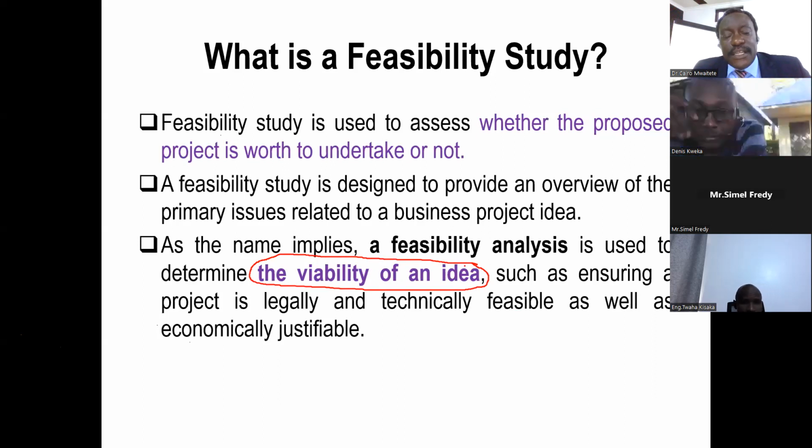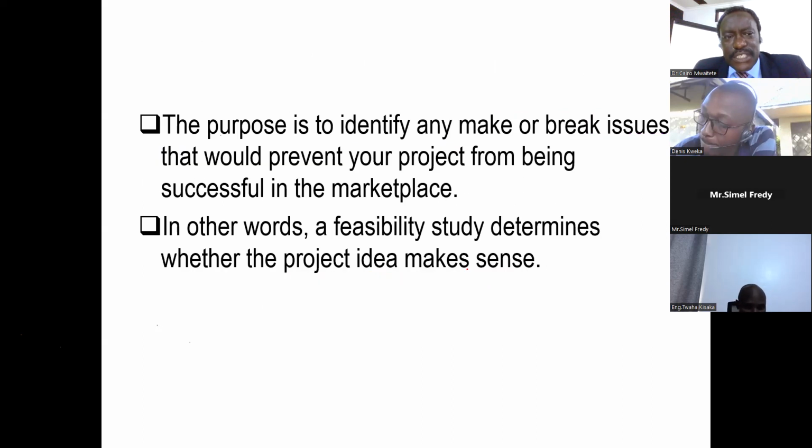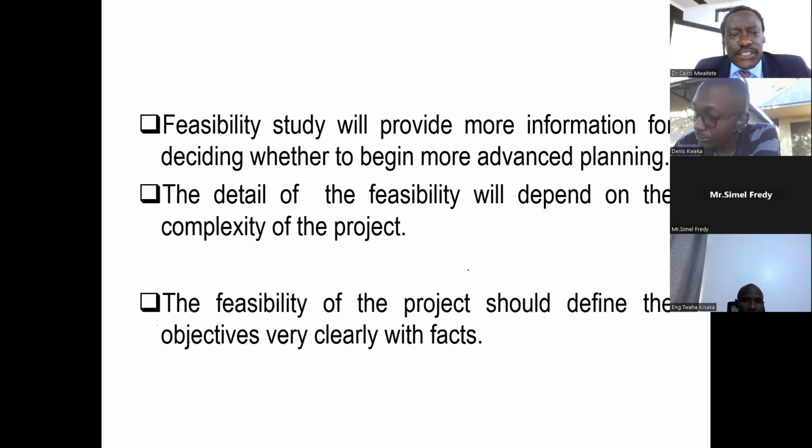With this, you'll have to assess the legal issues, the technical issues, the social issues, and all the economic issues and so on. The purpose is to identify any break that will prevent the project from being successful in the marketplace. And therefore, we assess: is this idea worthwhile for you to continue? Or maybe this idea is not worthwhile for you to continue.